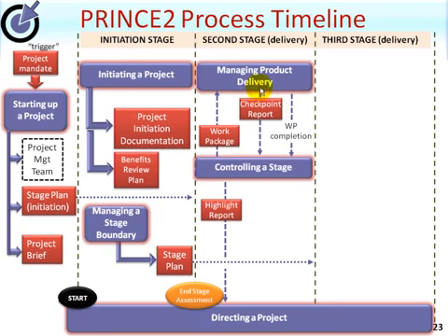Eventually, when all of the products in a particular work package have been completed, then the specialist team or team manager need to advise the project manager that the work package is complete. Once the project manager is satisfied that the work package is indeed complete, he or she may give out the next work package and the cycle continues.